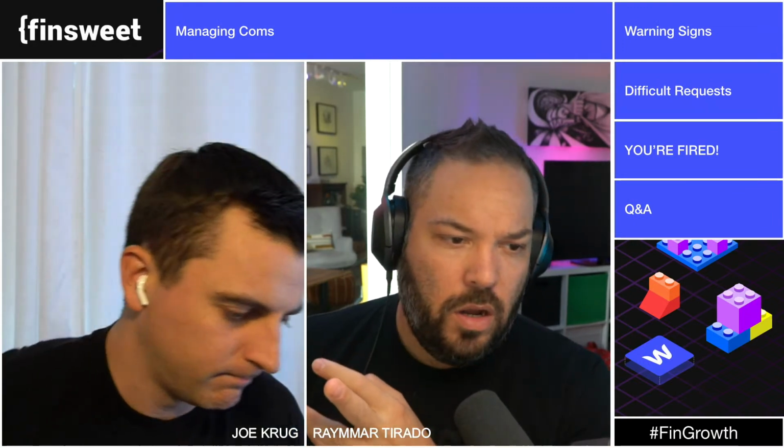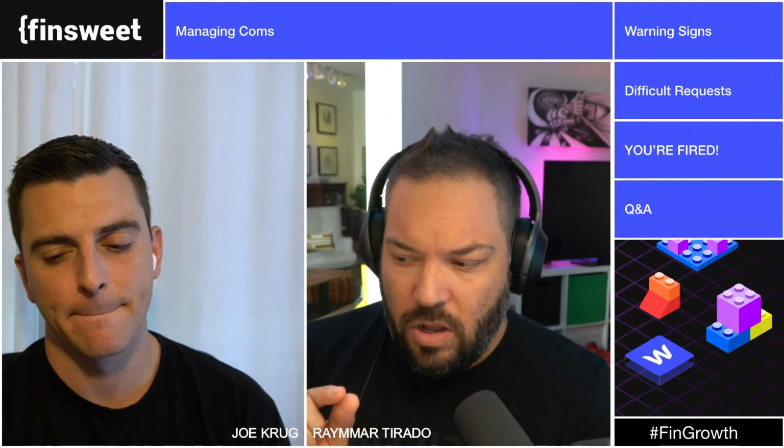So we've set the expectations. We've created a clear statement of work. We've set some kind of contract with the customer here. And now one of the things that I do on those expectations is always saying, who is our point of contact? Who is the person we're going to communicate with, right? This is especially important when it gets deeper into the project or when you're working with large organizations who may have multiple stakeholders, right?